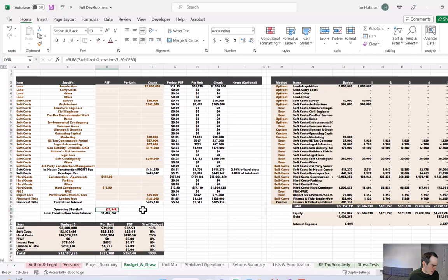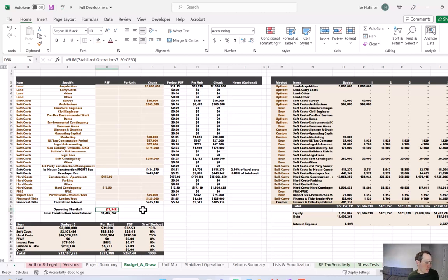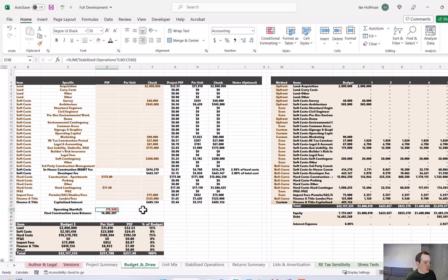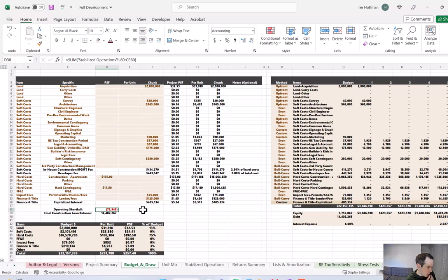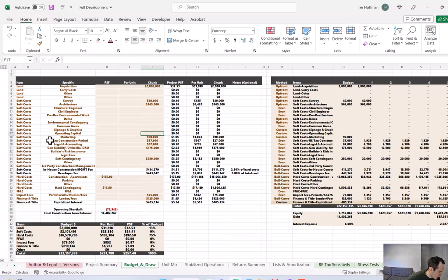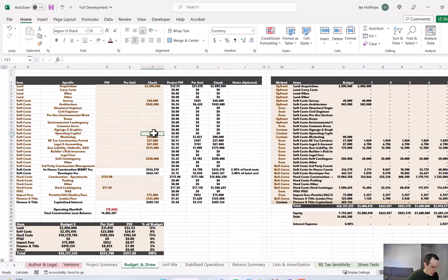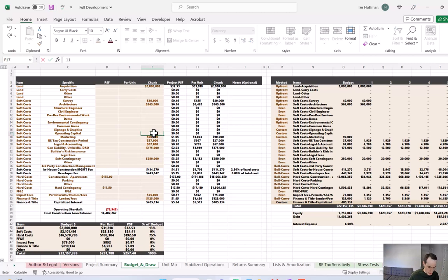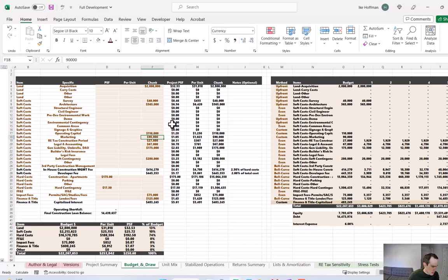I'm seeing that we have an operating shortfall of $75,000. So what's happening here is once this development gets the certificate of occupancy, early on in the lease up, there's not enough revenue to support the debt service. So essentially, we would fully draw on the construction loan, but the income coming in from rent wouldn't be sufficient enough to pay the construction loan interest. So what I like to do is when I see an operating shortfall here, I like to add an operating capital reserve. So I already have a row dedicated to that here and our operating shortfall is 75 grand and I want to be conservative, so I'm going to add $110,000 in operating capital and you can see it goes away.